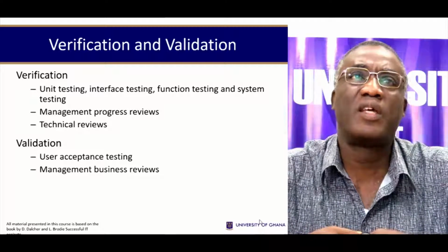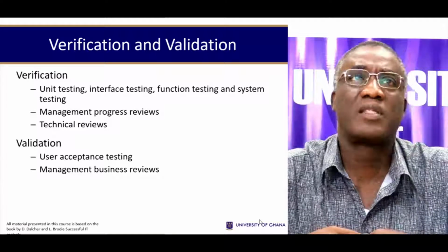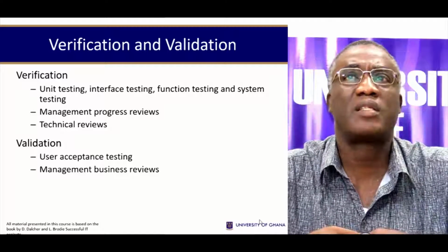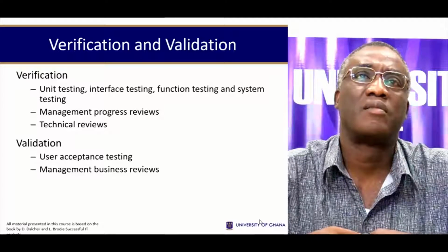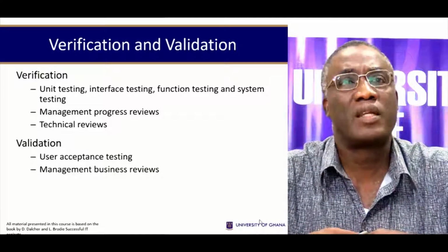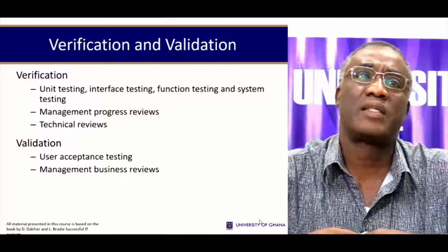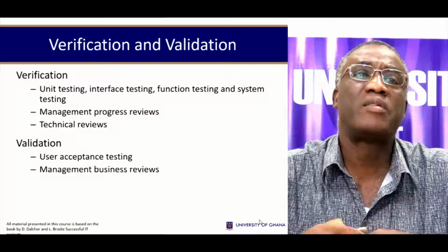To do verification, you may need to do unit testing, interface testing, function testing, and system testing. Verification will also involve management progress reviews and technical reviews. To do validation, you need to do user acceptance testing and management business reviews.